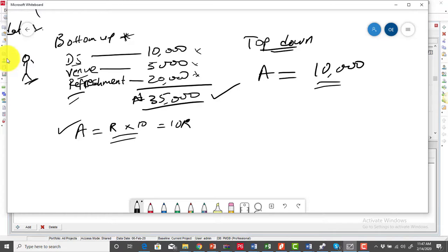So if you come back to Obalin's birthday party, before doing a top-down estimate, Obalin can now say, okay, for my birthday party, I'm going to be budgeting 50,000 for it. Therefore, this 50,000 is going to be shared amongst these activities and every other activity that may take place in that particular birthday. So that's exactly what top-down estimating, like I mentioned here, is used for.